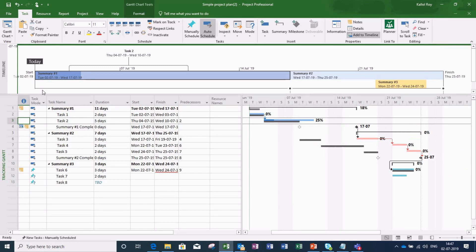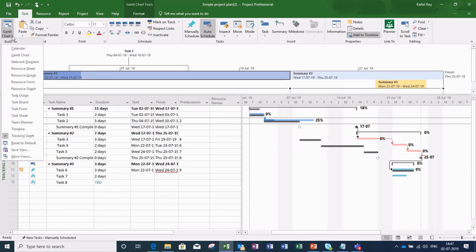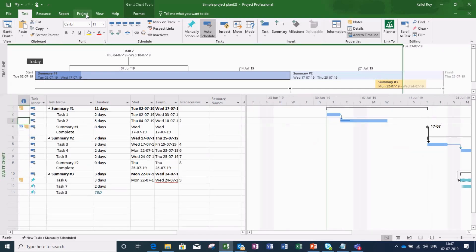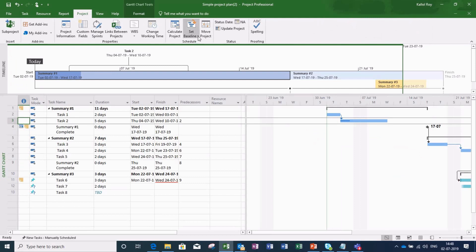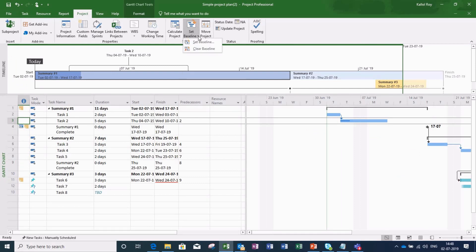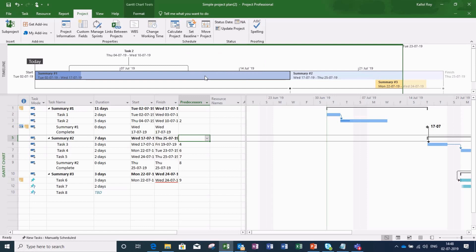Now I again go to the Gantt chart view and then to project menu, go to set baseline tab and clear the baseline. And now let me set new baseline for the project.